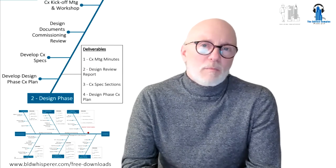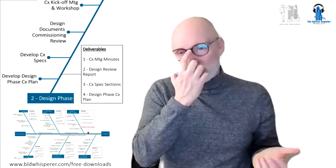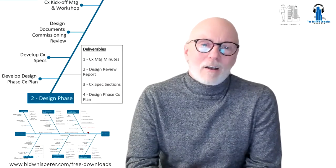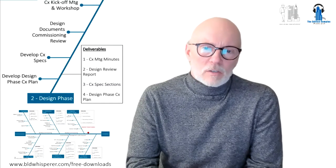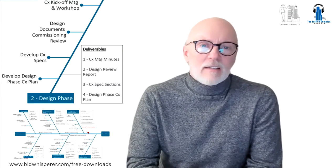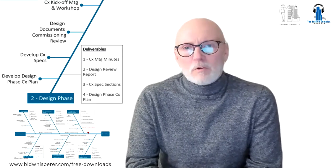The commissioning kickoff meeting is really, for me, the unboxing meeting. It's like unbox therapy for commissioning jobs. So the idea is to get everybody into a room and go through the whole commissioning process to get everyone comfortable and on board with the commissioning mission. So to answer all questions until there are no more questions, to explain everything, to make sure everybody understands their responsibilities and roles within the process. And also it's about removing excuses.